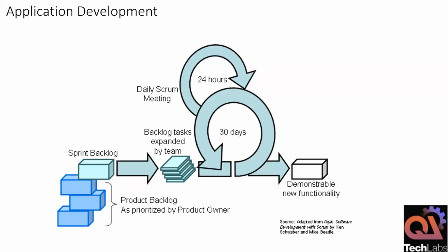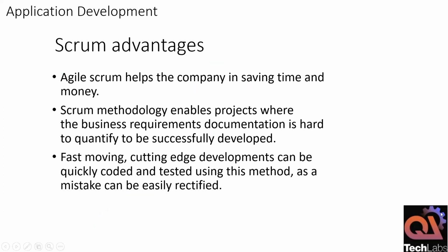for release planning itself, they have tools. So you would have heard about something called Jira. On top of Jira, there is some software called AHA. AHA will be able to define all your high-level release plans. So using a sophisticated tool like Jira, you can create end-to-end releases, end-to-end stories, and end-to-end test cases. So your complete traceability, you will be able to define, plan, and measure. So at the end of 2 weeks or 3 weeks, we will be able to demonstrate something called an output, and that output will be measurable.